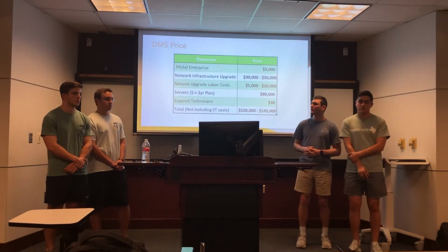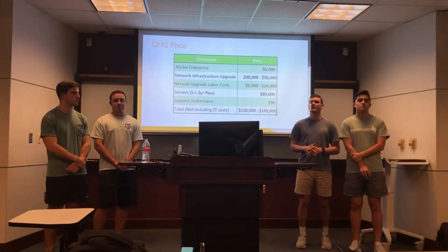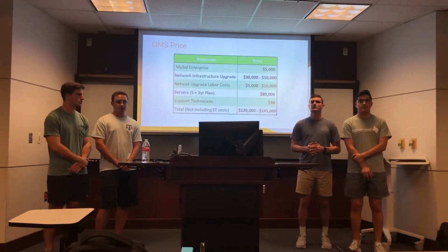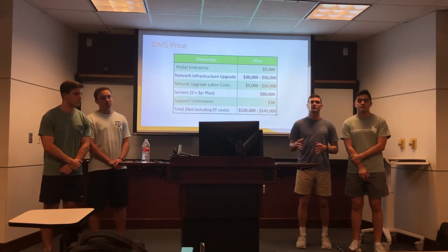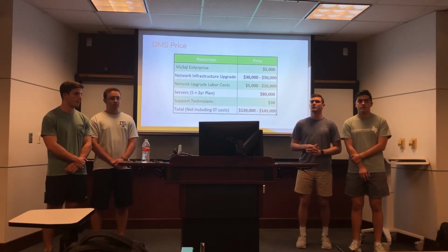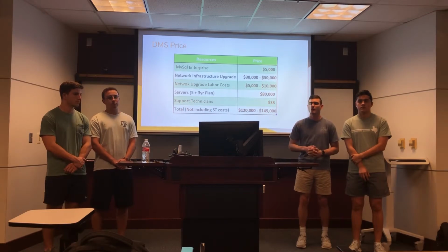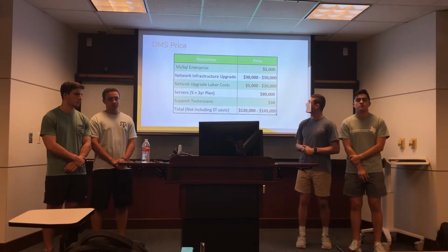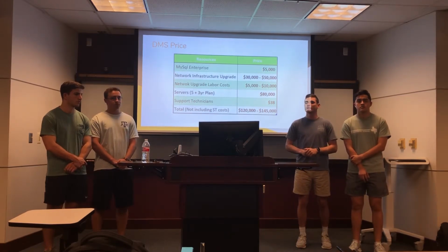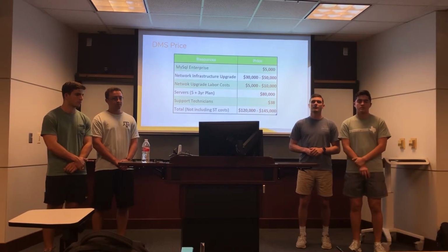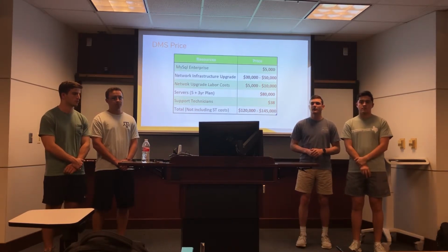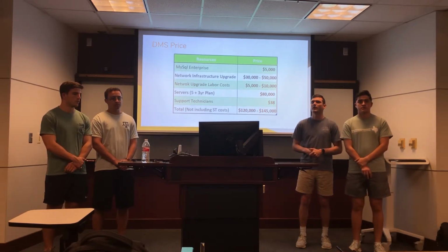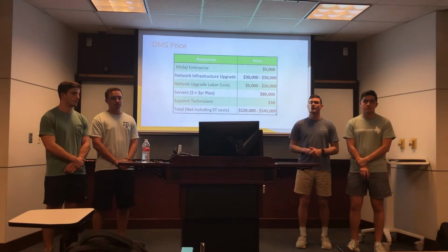Now continuing on and going into more in depth about the price of everything, the MySQL Enterprise license will cost about $5,000 for the first year, and you will actually not need to update that license agreement, so you will only pay a one-time fee of $5,000. Going back to when I mentioned the infrastructure for your network upgrades, that will cost roughly $30,000 to $50,000, and this, like I said earlier, includes any servers that need to be updated, any cabling, any other infrastructure, client PCs. If we need to restructure the architecture in some way, that will be allocated into that cost as well.